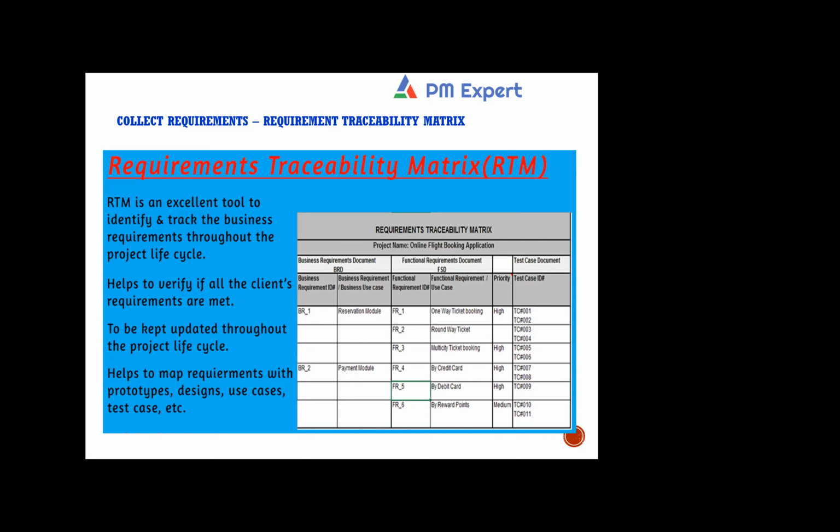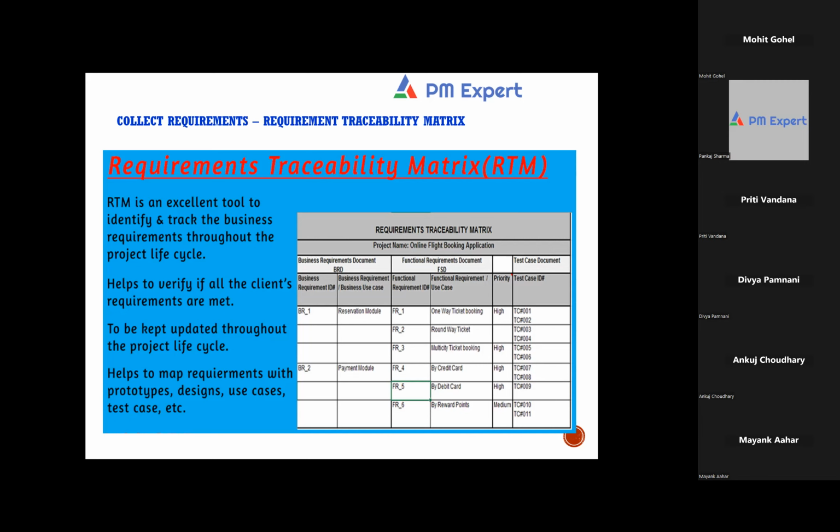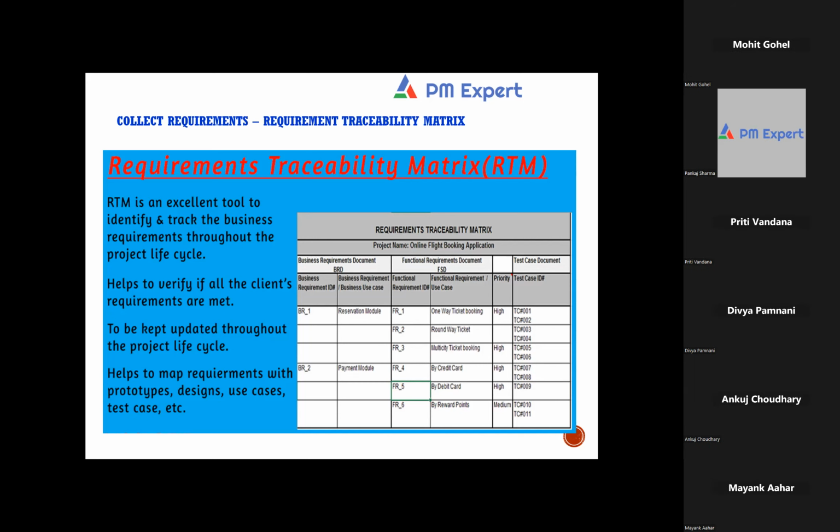Pankaj, tell me one thing, doing this requirement gathering at the start where you're doing that scope of work versus when you actually do a project and get into that requirement gathering phase of doing workshops, etc. Do you use the same document for both the phases, or do you do a requirement traceability matrix only at the start? No. Requirement traceability matrix same should be maintained throughout.